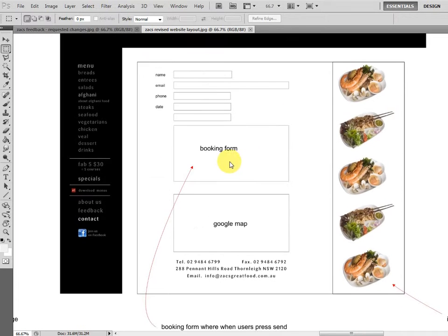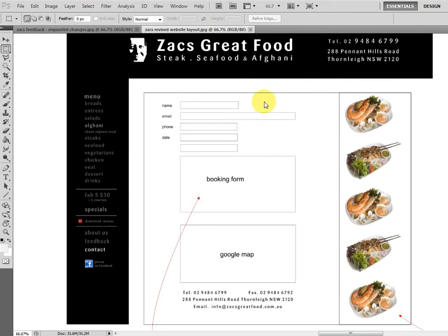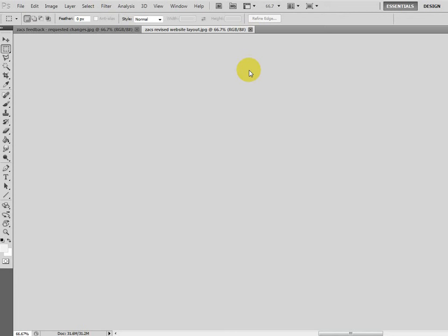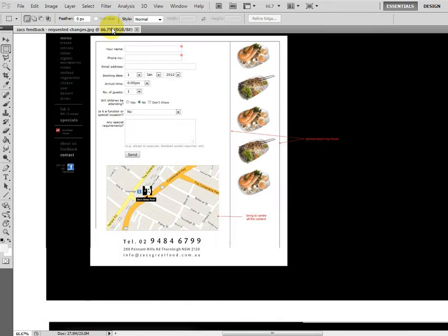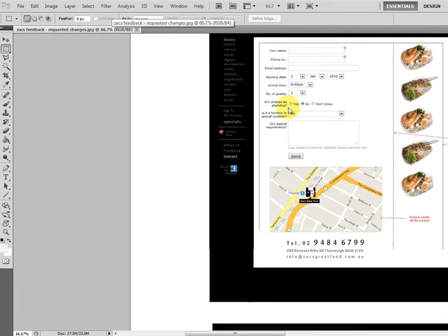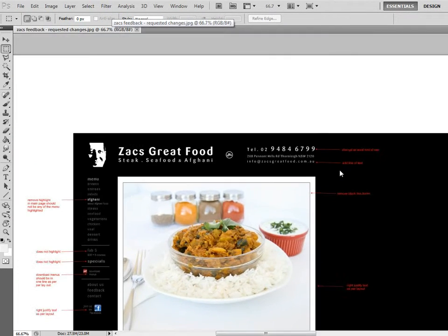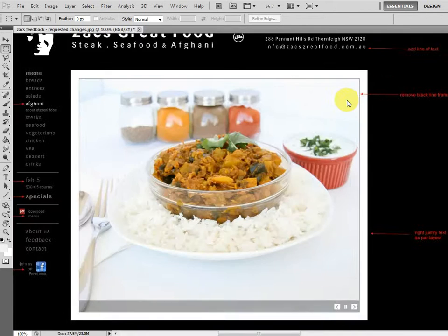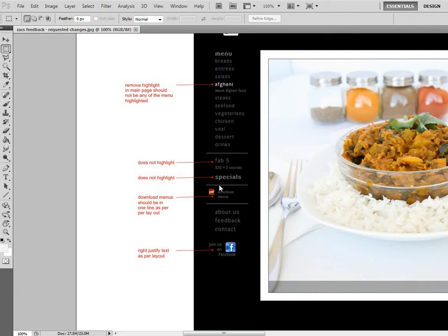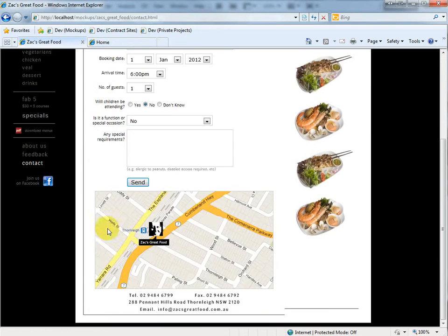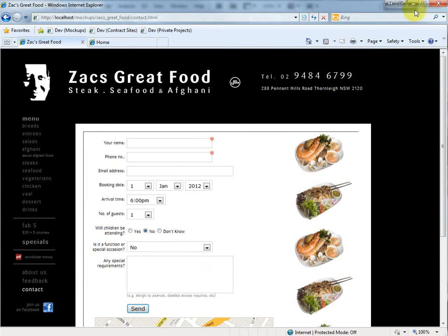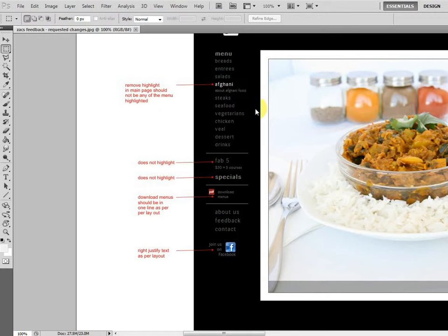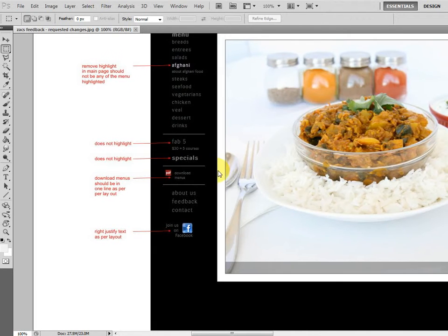So this was the original mock-up, and then this was a revised version. Some of the revised stuff I was able to do for Zach, and some of it I wasn't. You need to be aware of this because he might ask you again to do one of them. He might say, can you change this? But the reality is it can't be changed for a reason. Whatever you see here, this is the approved design in all of these pages. Generally deviations, unless it's going to be 5 minutes of work, you would need to talk to me about.